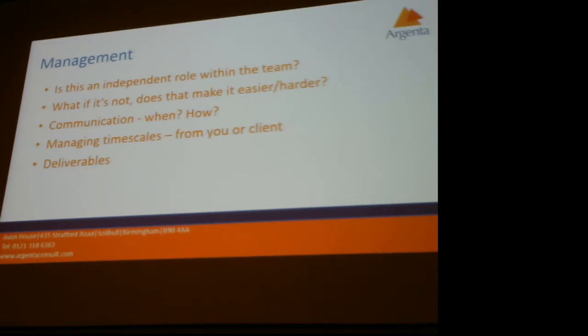There's another way around that, which is shorter but more frequent meetings. Meetings are normally, it's really hard to be effective in meetings, and you need to question whether you need to be there. But one thing that works for us as we get closer to production launch is we have daily stand-up meetings, which can be 5 minutes, but up to half an hour, normally 15 minutes. You generally only go if you've got something to say or you need to hit something, and that means that you don't wait for the next big meeting once a week. But it's a balance, because if it's optional, it's a risk.